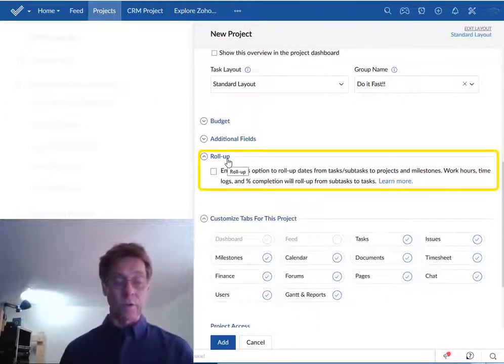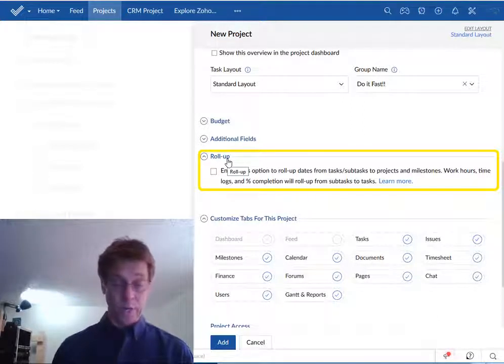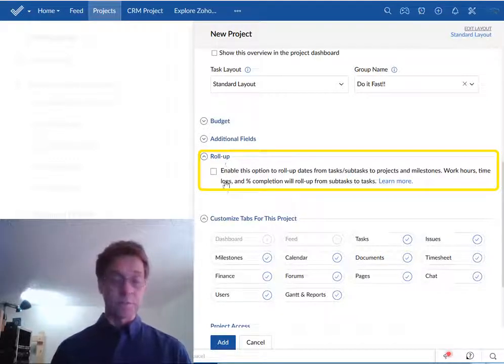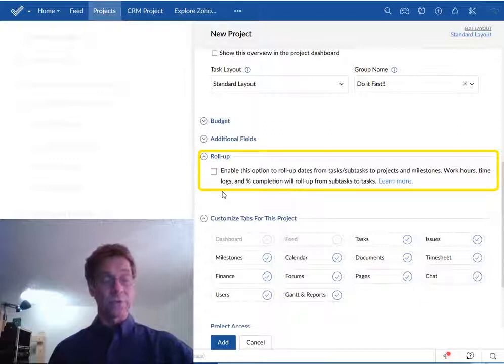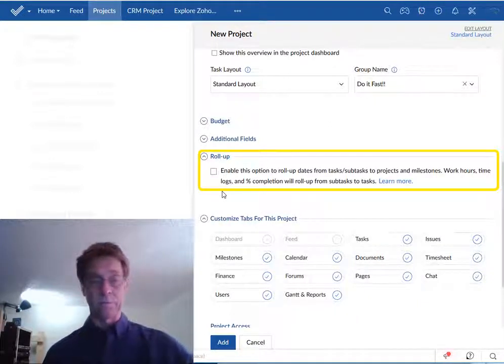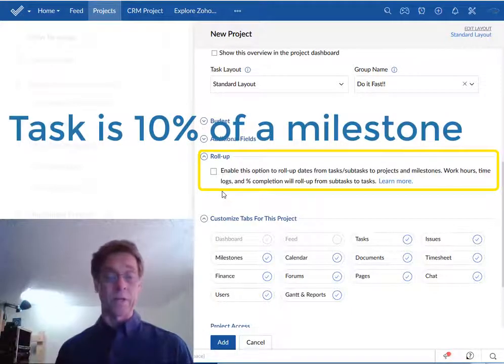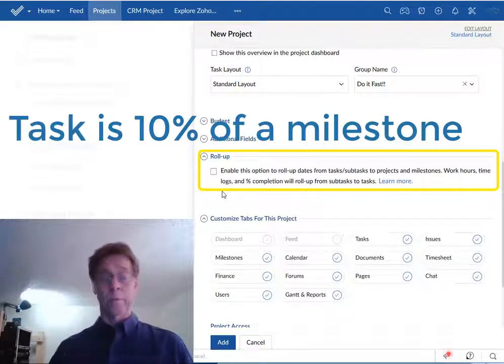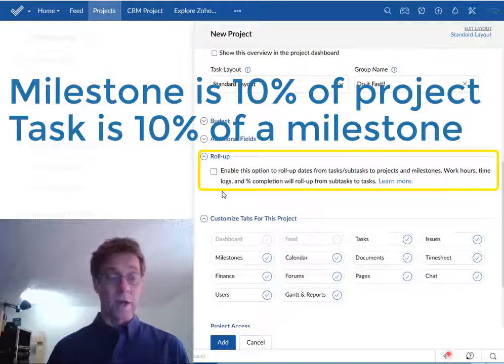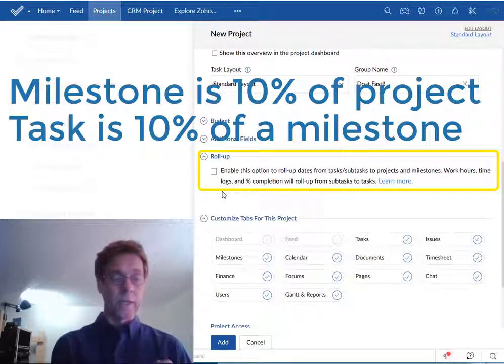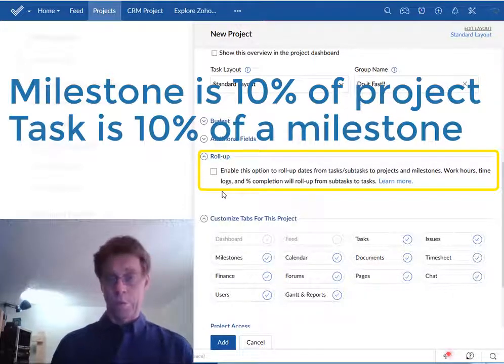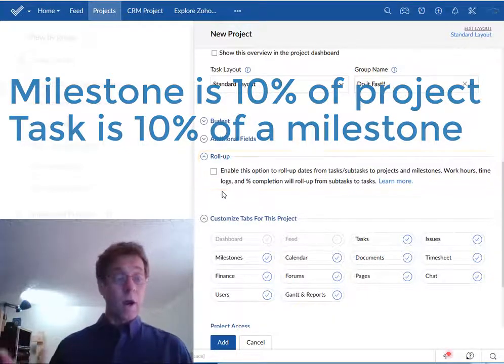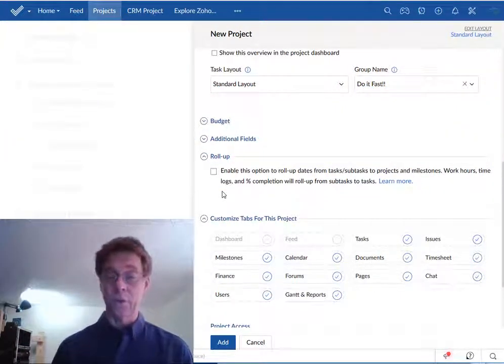Checking the roll-up option. This is complicated but it's worthwhile. This means that as you complete subtasks and tasks the cumulative completion status will be calculated for the associated milestones and for the project itself. So when you complete a task that represents 10% of the work to complete a milestone which is itself 10% of the overall project workload then the milestone associated with that task will show 10% completion and the project itself will show 1% completion which might seem a bit sad but even so I suggest you keep this checked so that your completion status is easier to track.